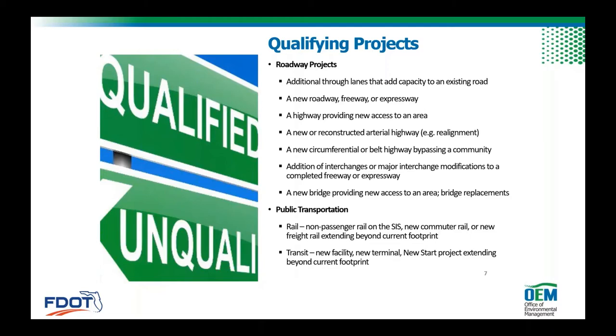And part of that coordination of we need to know your answer earlier so that we don't make huge changes later is that they needed to also have some resources in place that could engage us at the point they needed to engage us. So we worked with them and through Federal Highway to provide federal funds to our state and federal partners so that they would engage on our timeline. Now, we're not paying for their answer, but we're paying for their response on time and their access.